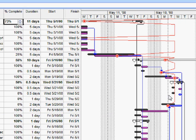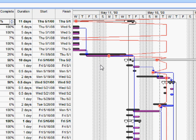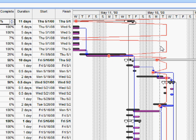All these lines and bars here convey very good information but zeroing in on the areas that are of most concern to you that are doing particularly badly compared to others can be difficult. Nevertheless we can see here for example that this task has slipped against the baseline. Not only that, progress is not where it should be. Today for the sake of this particular project schedule is May the 18th. So we should be much further ahead. In fact this task should have finished by now.